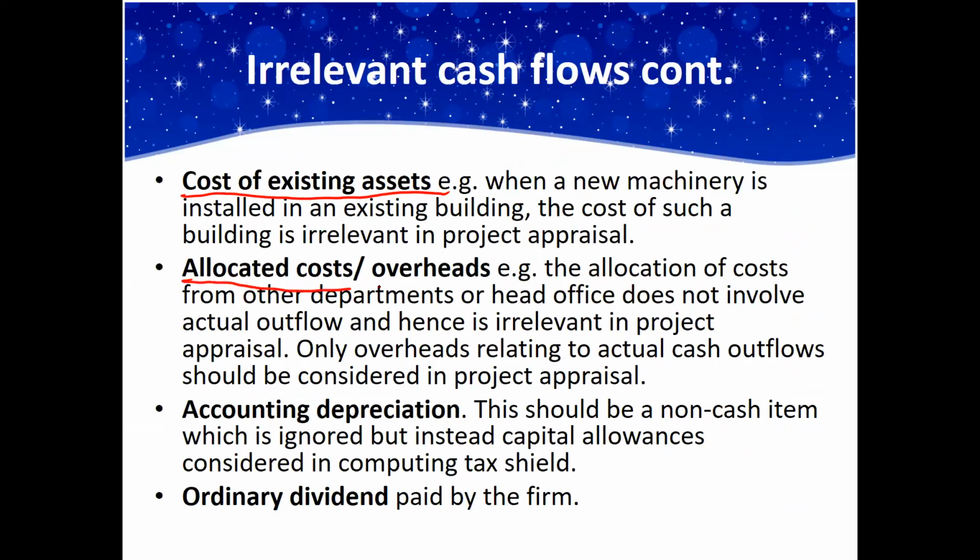If you have what we call overhead costs, these are costs incurred elsewhere that are being allocated to the department or to this particular project. Therefore, they are also irrelevant. Any cost that is allocated is also irrelevant.